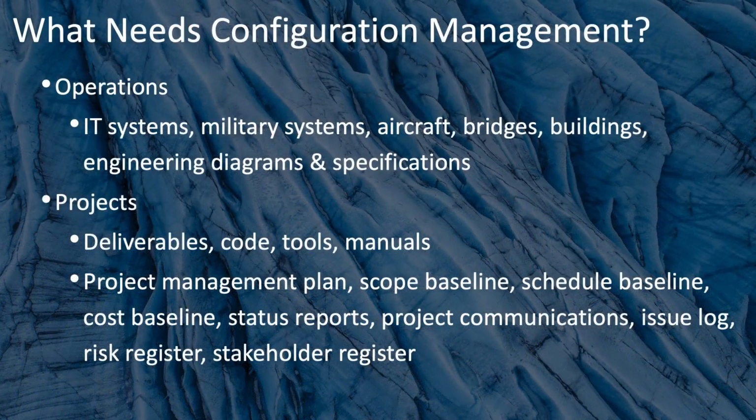What needs to have configuration management applied? Everything from physical items to documents, forms even, and all sorts of records. Any items that must meet legal requirements, items that must meet health and safety guidelines, items that are sent out to subcontractors, vendors, or partners, items that have an impact on processes or deliverables outside of the current project, items that form a large component of your project's deliverable or deliverables.